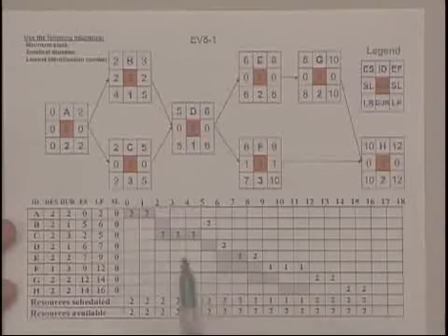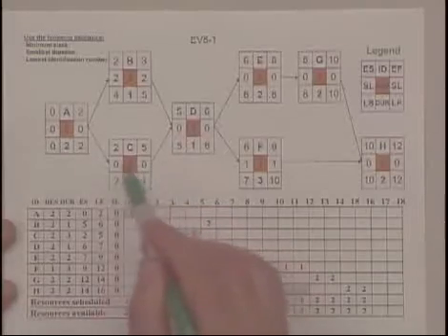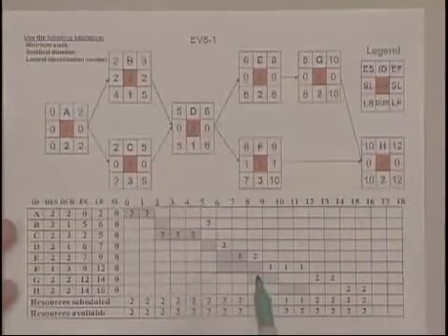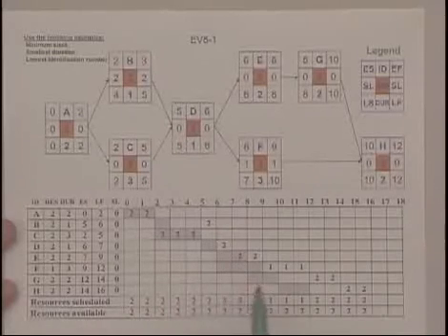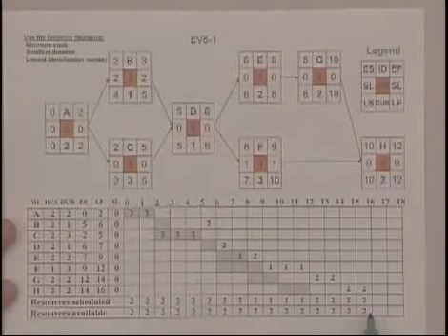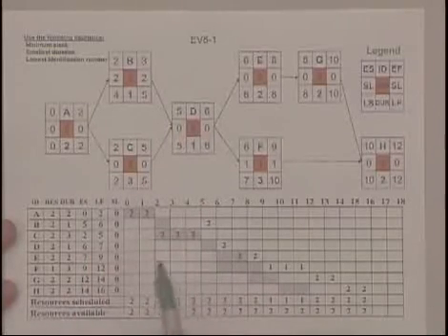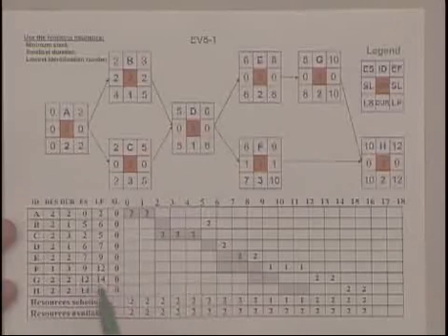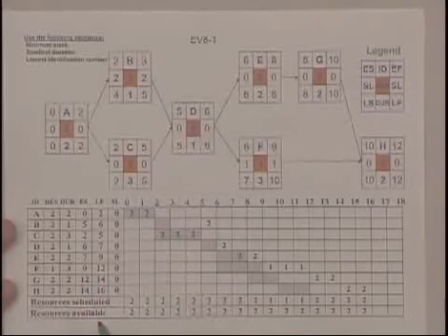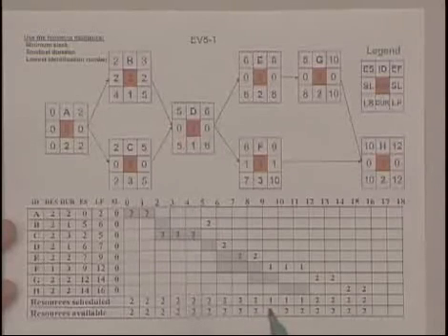The other thing that's occurred is look at the slack in the revised schedule. Remember, before we introduced resource constraints, we had 1 critical path. Now, if you look at how it's set up, a delay in any one activity would cause the project to take longer than 16 weeks. So the network becomes very sensitive. All the activities are critical, as you can see here with the slack of 0, and the start and finish times have been changed. So this is a second impact that resource constraints have on a network. First one is extends the duration of the project, and the second one, it increases sensitivity or alters the original critical path.